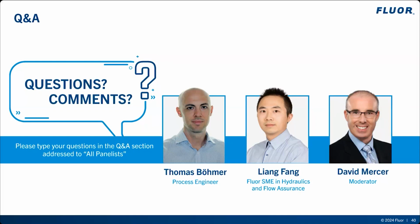That's why sometimes an initial surge study can be performed at an early project phase based on estimated or assumed data to support a project cost estimate. Then we can recheck and confirm the surge mitigations during later stages when the information becomes available.